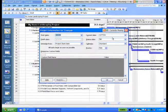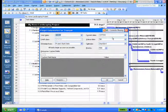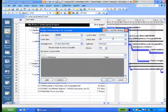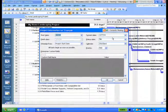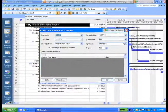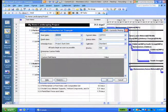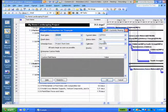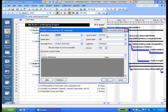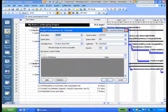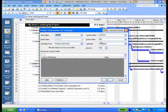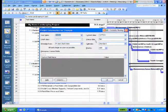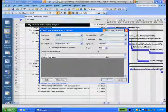And then last but not least, there's the current date. That'll automatically try to be the current date, whatever it might be. But often, we schedule reports to a specific date, to a status date or to a different date. So these two fields, the current date and the status date, can be adjusted. I would encourage you to ensure that the current date is correct, that it hasn't been overwritten, and that the status date initially says NA. And that may change over the course of a project. More on that next week in session three.